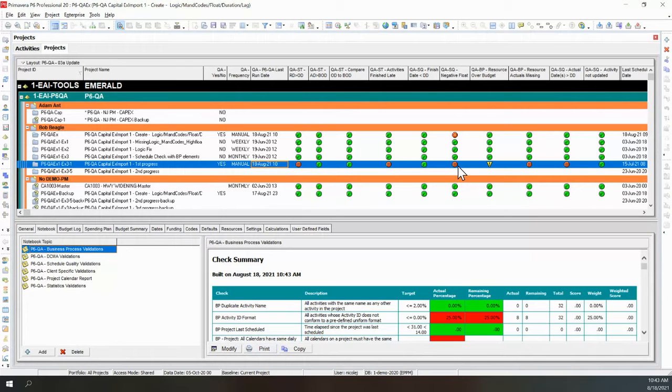We've got to work with the activities and clean them up, perhaps overlap them, perhaps split them, perhaps double up the crews or change the calendars. So there's things we're going to need to do to fix that negative float. We've got some resources that look like they should have actuals, but they're missing. So we've got some activities in progress and the resources have no hours on them. So that's something to understand, because your cost forecasting could be wrong if resource updating has been missed.